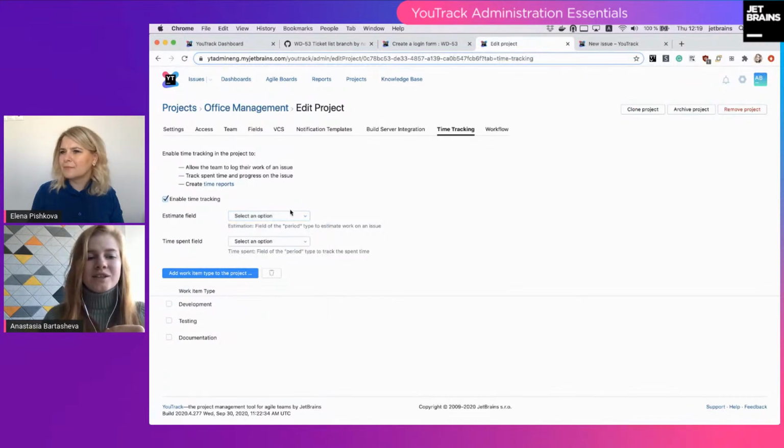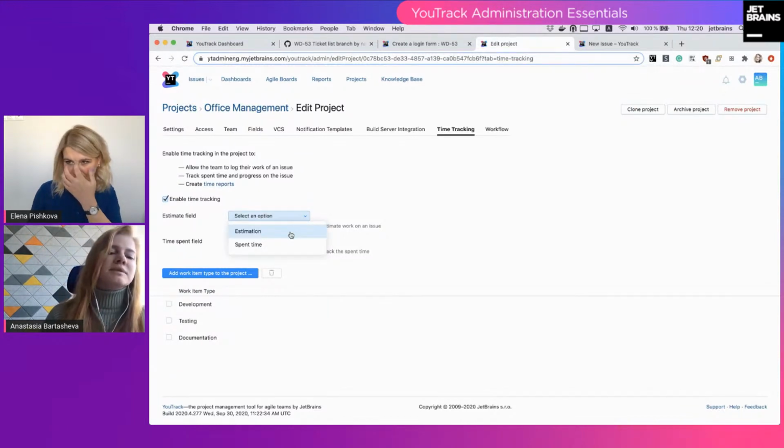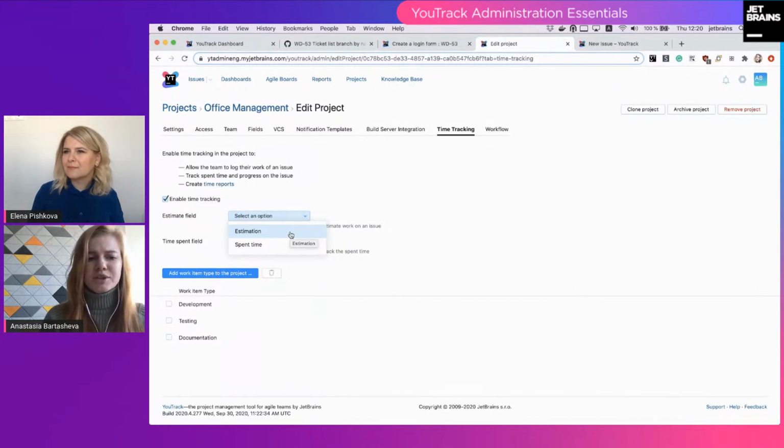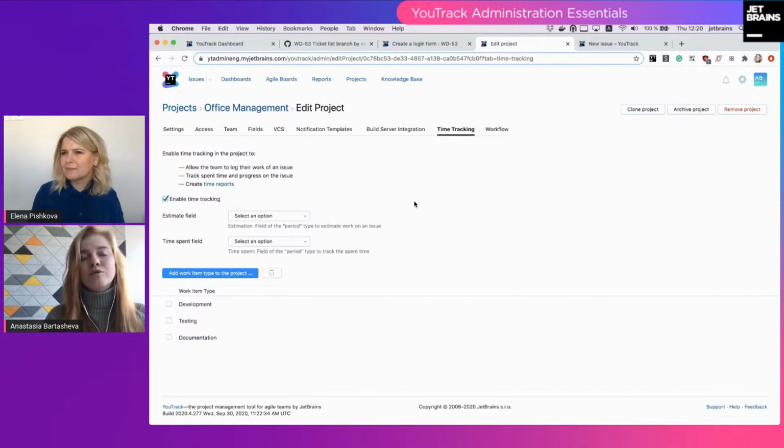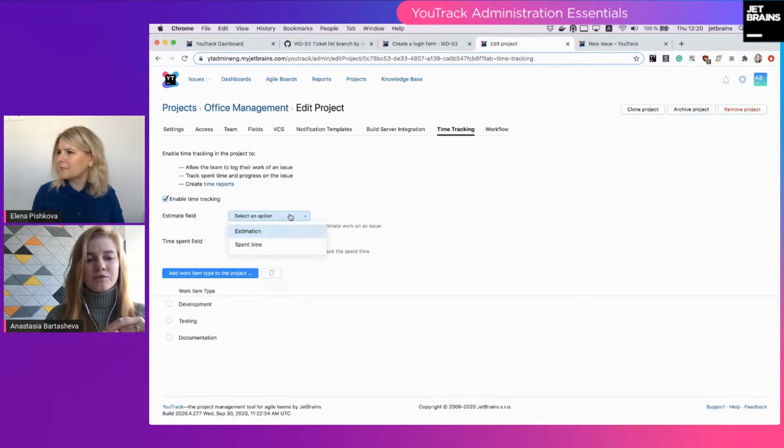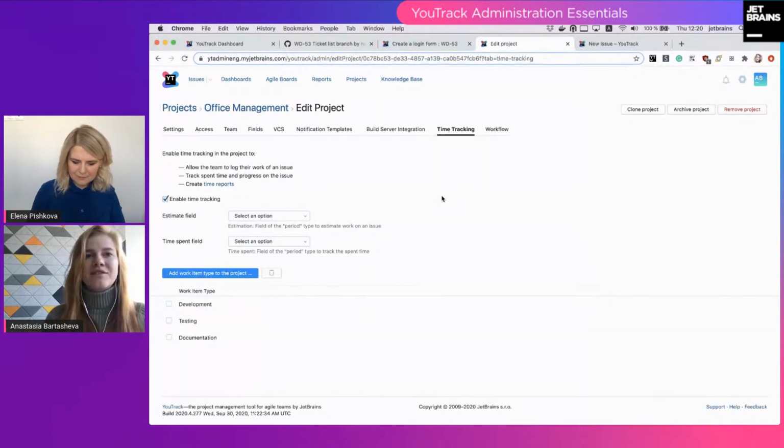Because time tracking can use only one field when we're talking about building a Burndown or some reports. So if you need your reports, you have to use one field here that will be a sum of all estimations done by different roles. And we'd recommend prohibiting manual editing of this main estimation field in this case, to keep things consistent and not to lose your sum value.